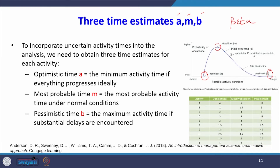The mean of this beta distribution is: optimistic time plus 4 times most likely time plus pessimistic time, divided by 6. This is the mean formula for beta distribution. If the project completion time followed uniform distribution, mean would be (a + b) / 2. Since we assume these three time estimates follow beta distribution, the formula for mean is (A + 4M + B) / 6.